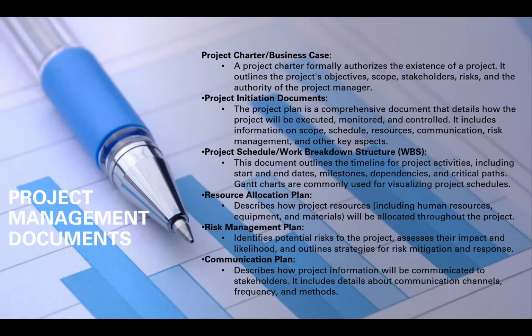After the business case has been made, then who will execute this will now look for the project manager, who will begin to bring out the project initiation document, go into requirement gathering, ask questions, look at other projects, look at who can deliver this solution, who is the supplier, who is the vendor that we need to contact, who are the resources we need to put together to achieve this. All of this is organized, the time frame, the cost, the communication, and organize it inside the project initiation document.